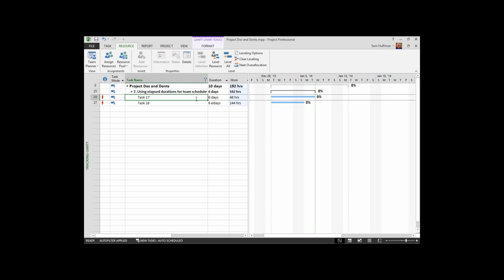Durations themselves are what are used for the human aspect of the project. Things like servers backing up or being upgraded, or those types of tasks where we are working 24/7, that's what was intended here with the elapsed duration units. Be careful in using people with it, however. It's very hard on people. They just cannot work that much work consecutively and contiguously. Elapsed durations. I encourage you to get into the help, look at them in terms of their definition, maybe even experiment with it so you can see these two very, very different approaches to duration in Microsoft Project.